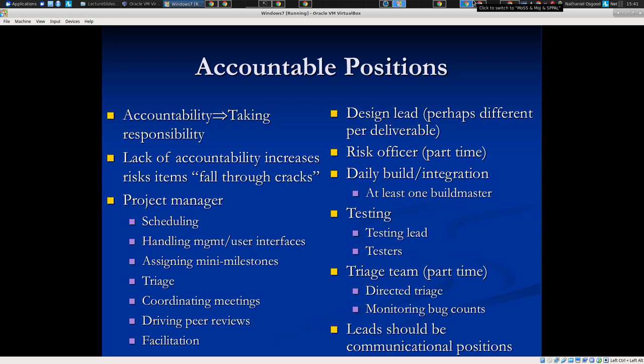So good. Other, yeah. Ambition in your requirements? Sorry? Ambition in the requirements. Yeah, too much ambition, sort of saying we're going to gold plate this, we're going to do way too much, and you overpromise and are unable to deliver. Remember this.